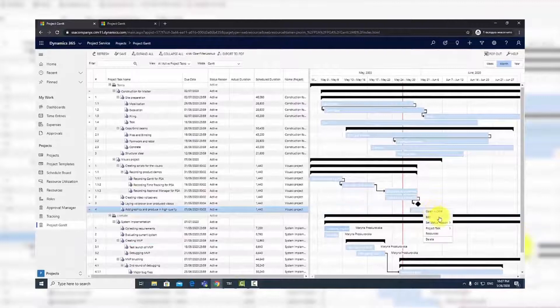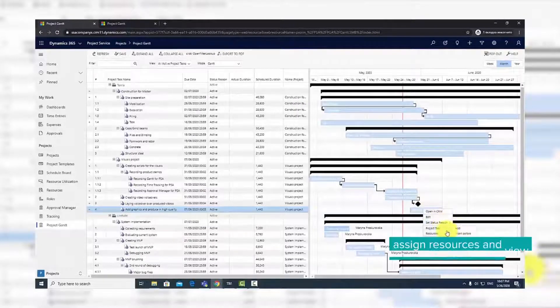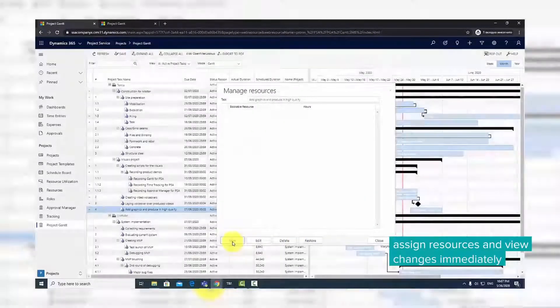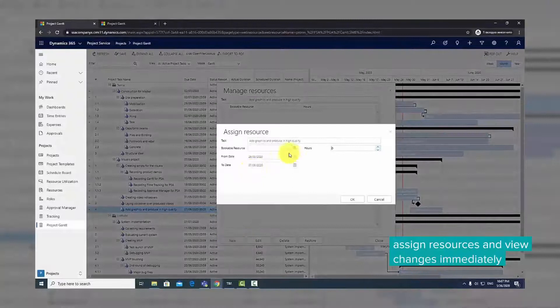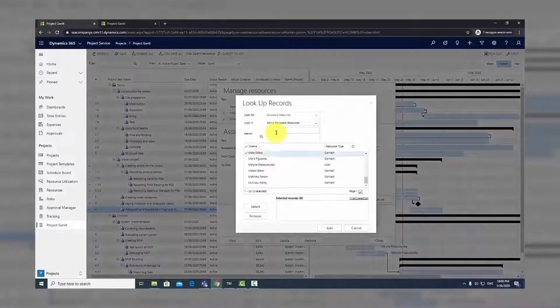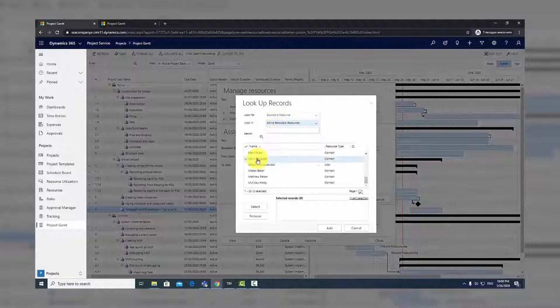There, select Resources. You will then see a list of all project assignments. Click New to assign a resource. Fill in the required information in the pop-up window and confirm.